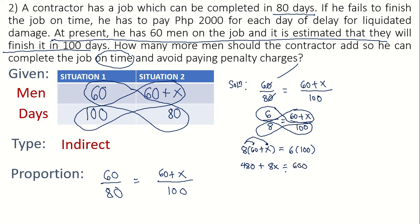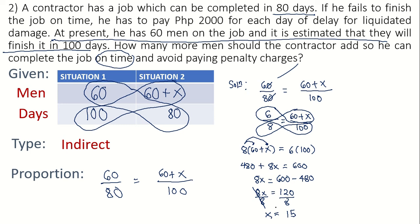To solve for X, transfer 480 to the other side: 8X equals 600 minus 480, which is 120. Dividing both sides by 8, X equals 15. So what is this 15? It represents 15 men.